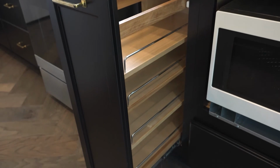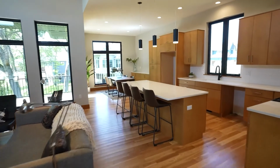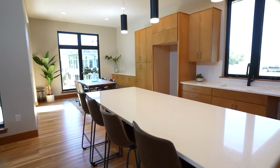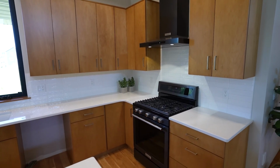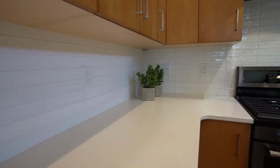So you start a project, once the walls are roughed in, cabinets have to be measured on site. They need to be specific, because you're getting them to the inch or whatever, custom made. And so you measure it, and you order it, and they come in and you install it. Do you think there's any end in sight on all these supply chain issues? I don't know if there is or isn't, but at the end of the day, cabinets have stabilized for us.